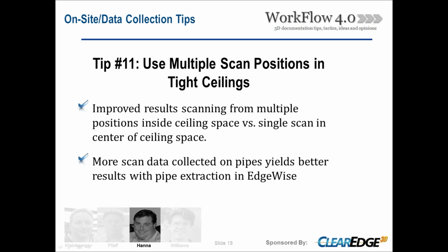I'd like to make a comment on that too. The lower the ceiling clearance is from the plenum, ultimately the more scans you're going to have to get to saturation in that area. So if they send someone out to get an estimate, if they know nothing else, have them check what the span is from the plenum up to the hard surface of the ceiling. Okay.